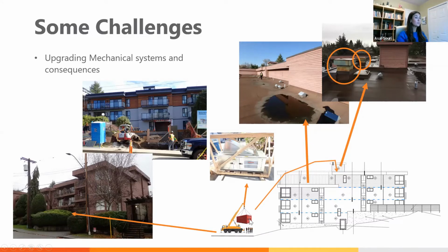So to put these units up in here, we need to have the lifter truck as close as much as possible to the building to be able to lift them up and put them here. That means we had to do the huge excavation in here, as you can see on the lower left corner of the landscaping, and get it as close as possible and put it up here.